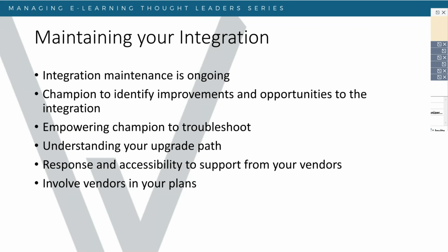Yeah, it does. There have been times when I've started an implementation where there's an integration, and then the client has said, "Oh, we're going to be updating our AMS in 3 months." So understanding that upgrade path and planning for that is going to be very important. It's also important to let your LMS vendor and your AMS vendor know. In most cases, it's not going to be too much of a change, but it's good to have that open communication.